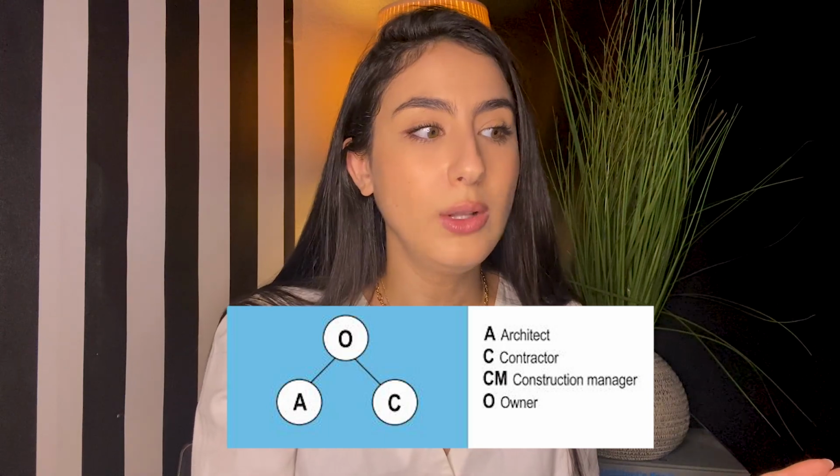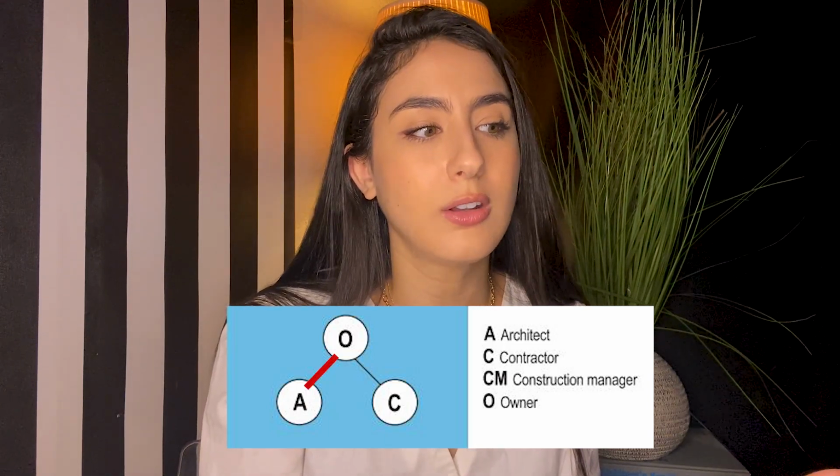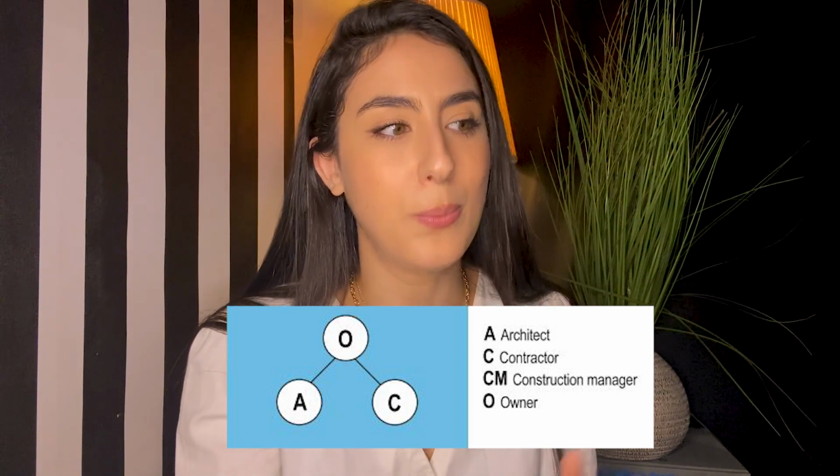So you never tell anyone to stop the work. You let them do the work. You have to let the owner and the contractor know right away. You let them decide, because at the end of the day, the architect does not have a contract with the contractor. Remember this: the architect can only talk to the owner and sometimes talk to the contractor, but they cannot tell them what to do. So you let the owner and the contractor handle that. You don't get involved. So that's the third role that you do during the construction. As I said, you answer RFIs, you review submittals, you generate field reports.